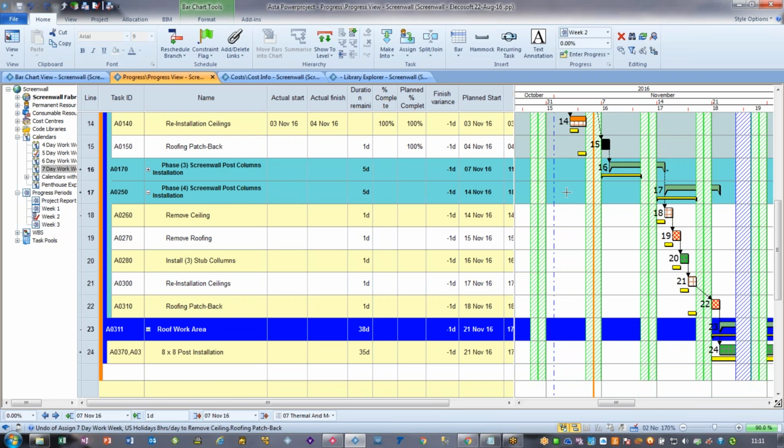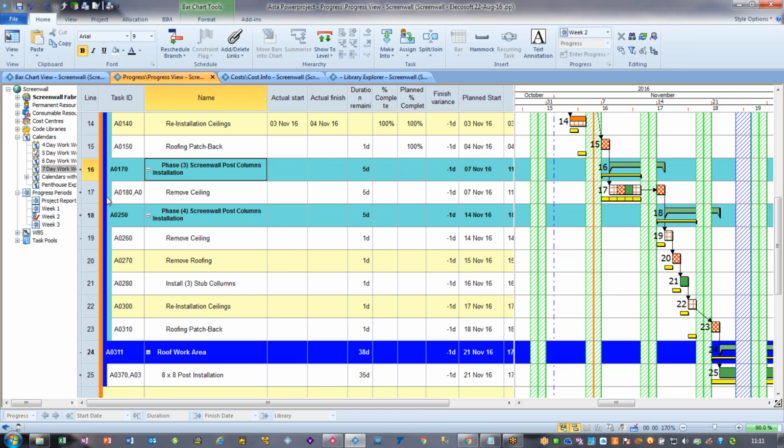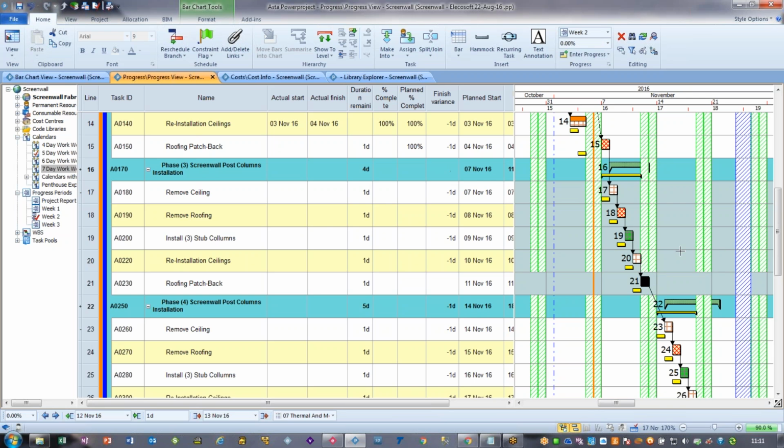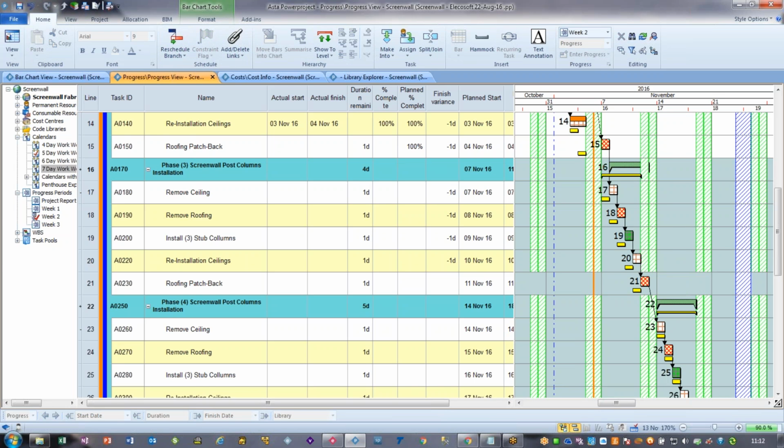That guy couldn't work on this Saturday, but maybe there's an opportunity to do something next week and catch up in another way. So this is what we should be doing next week. So the roofing guy's got to do, but what he's promised to do that next week. So we're going to change next week's calendar to make this available to start earlier. Okay. So if we schedule now without any progress, that brings us back on plan because we intend to work in a day that we weren't going to work before.